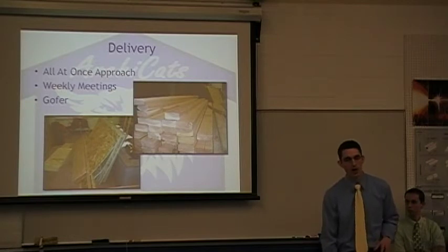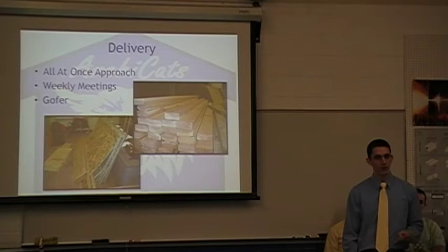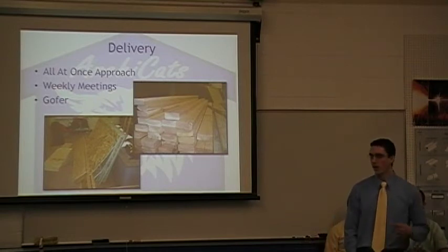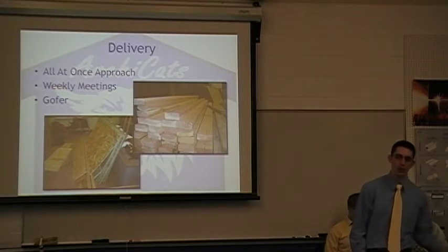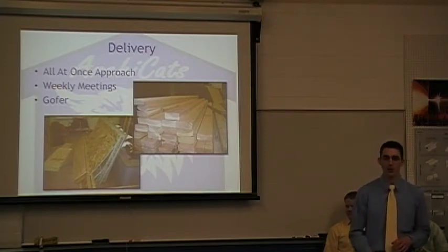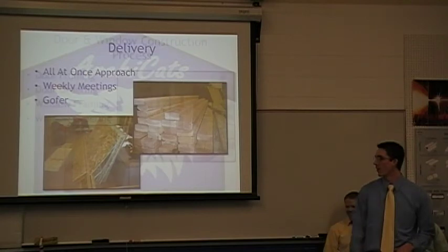Now, as far as delivery process, we used 3 methods of delivery. We used the buy it all at once method, which we used with the lumber. That way we had everything there so we could just start framing them all. Then, as we mentioned before, in weekly reports, we discussed what we need for the following day and then the next week. And then I'd write that down and we'd go pick it up. And then the third method, which was probably more common than it should have been, was the gopher method, where we need this, go for it. So Lowe's got a lot of midday visits from us.